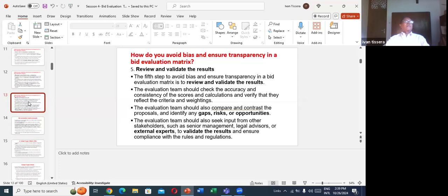properly done, right? Then one thing he can do is invite both the TEC and the procurement committee to get together and jointly evaluate. Earlier, the TEC separately and the procurement committee separately gave their recommendations. Now the head of the department can invite both committees to get together and give a joint evaluation.